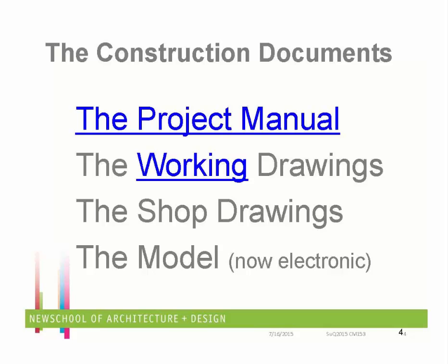Well, all of a sudden, he'll be on the phone to you and say, hey, that little change quintuples the cost of each of those doors. If we went to 3'4", you'd have a bigger feeling door, but it would fall in the same cost range as a 3-foot door. You go to a 4-foot door, all the physics are different. The hardware's heavier, the doors are heavier, the frames have to be reinforced more, the hardware has to be a 5-screw hardware as opposed to a 4-screw hardware.